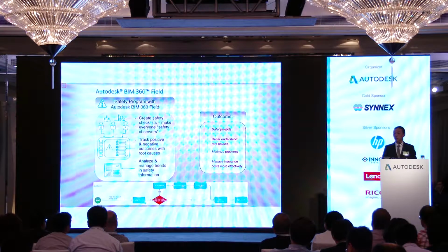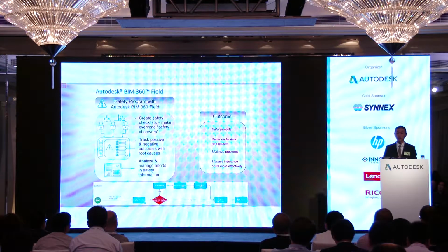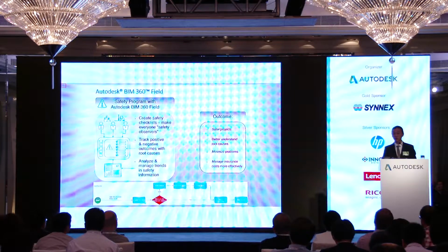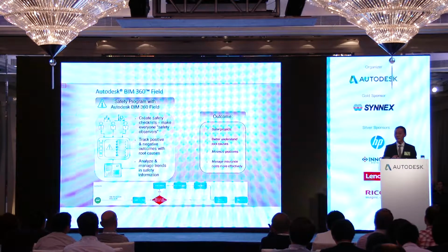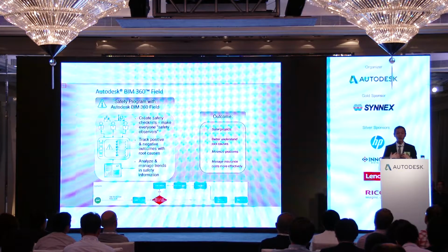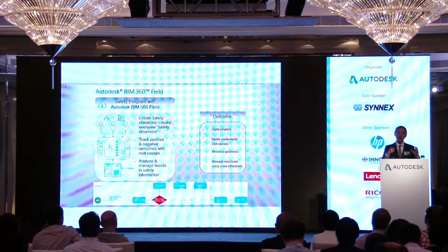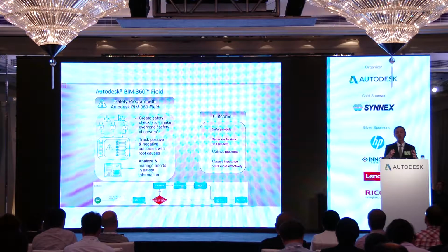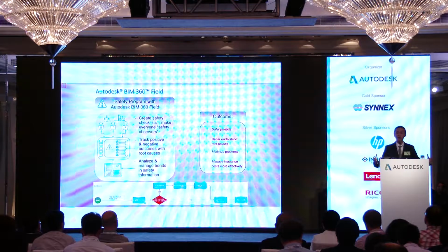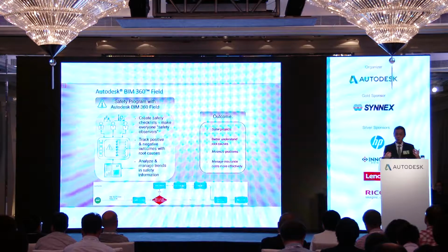And because I used to be on site working and taking the site diary and site photos as well, but before, I didn't have this kind of software. We used to have to argue with the main contractor quite a bit, because my data is not the same as theirs. Imagine how many laborers are on site, and that's to do with payment. With 360 Field, you can record how many laborers are actually on site, and the same record goes to the consultant as well as the main contractor. So it's the same data, a single source of truth to do payment and all that.